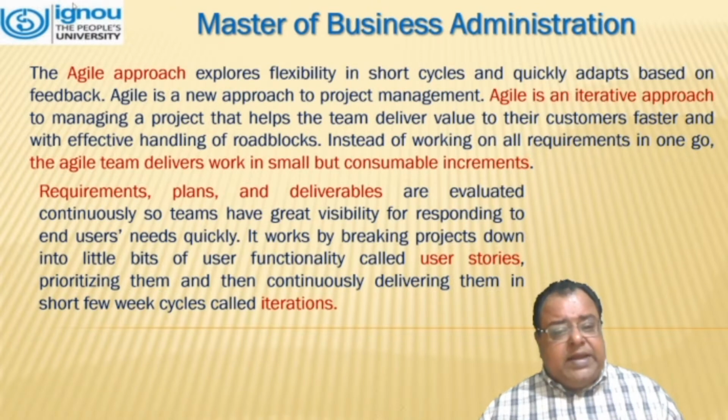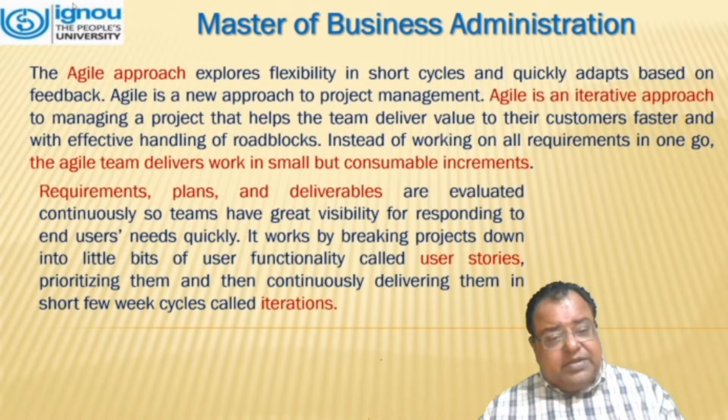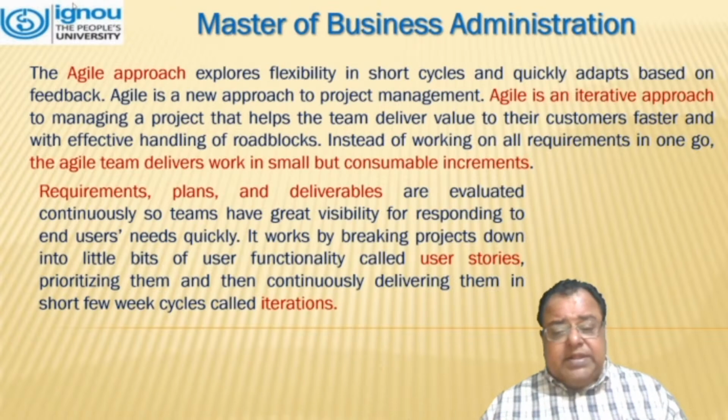Requirements, plans, and deliverables are evaluated continuously so teams have great visibility for responding to end users' needs quickly. It works by breaking the project down into little bits of user functionality called user stories, prioritizing them, and then continuously delivering them in short few-week cycles or iterations.